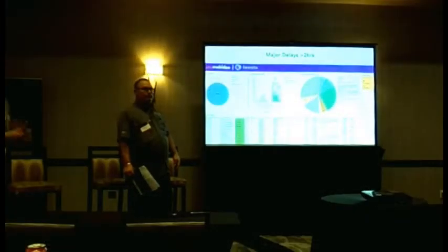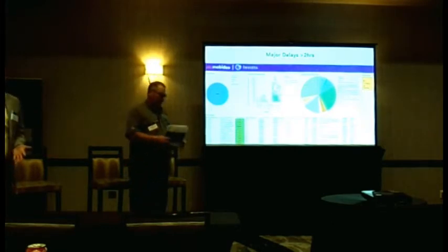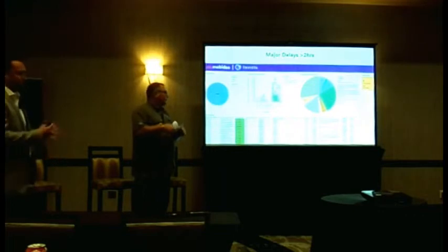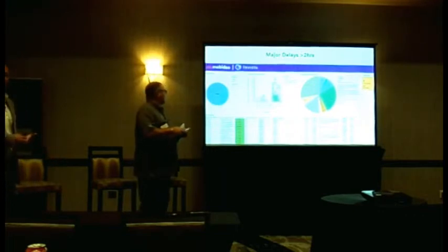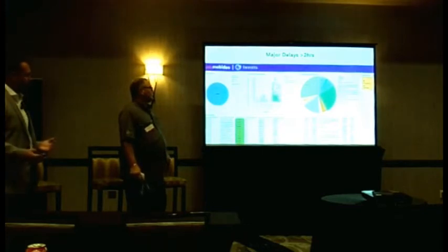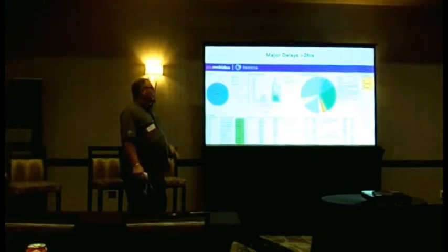Each of those situations is different and needs to be managed in a different way. A minor delay, you may say, hey, a permit was 20 minutes out the door, I'm just going to have to eat that inefficiency, it is what it is. But if it's a major delay and a crew actually needs to be reassigned to some different type of work, then there's different action that needs to be taken. So, Mike, how do you guys use this particular report?